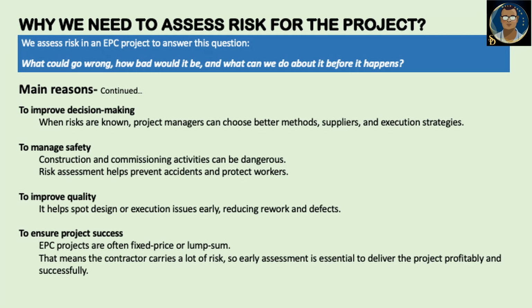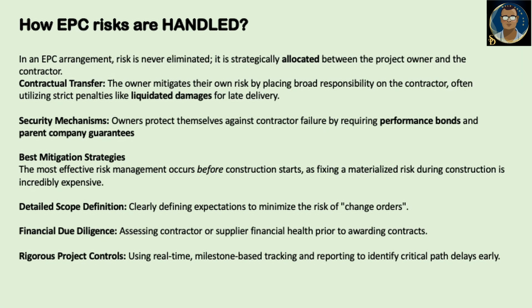To ensure project success, EPC projects are often fixed price and lump sum. That means the contractor carries a lot of risk, so early assessment is essential to deliver the project profitably and successfully. How are EPC risks handled? In an EPC arrangement, risk is never eliminated. It is strategically allocated between the project owner and the contractor.